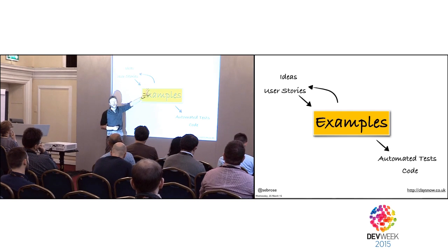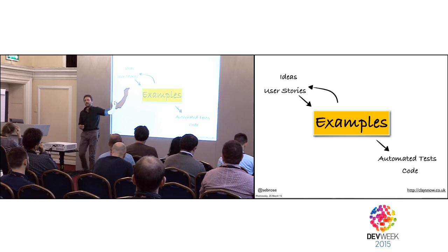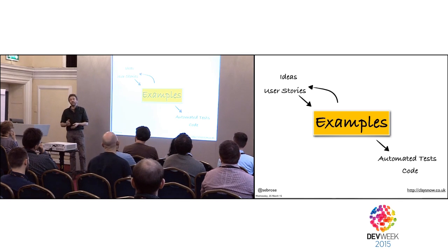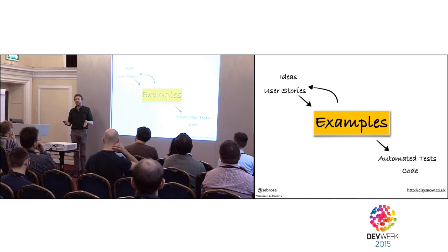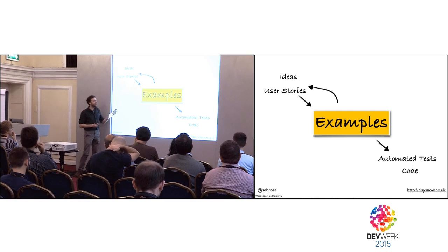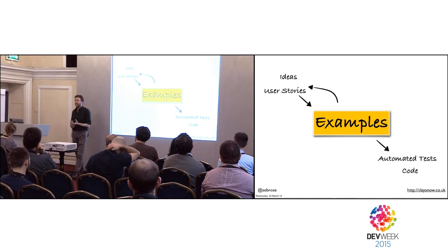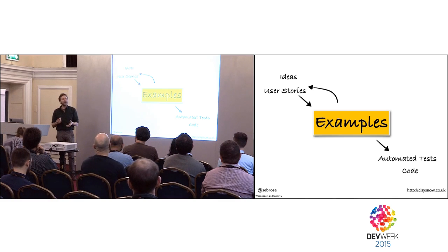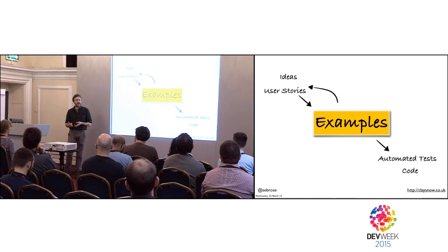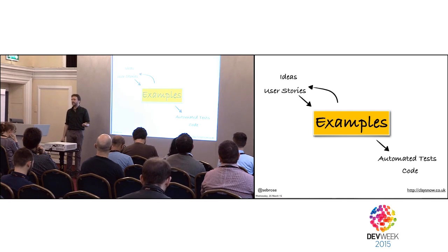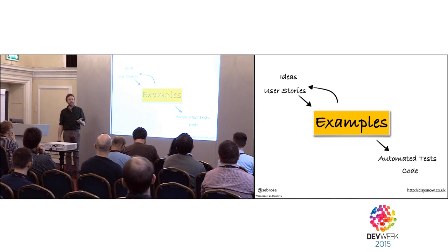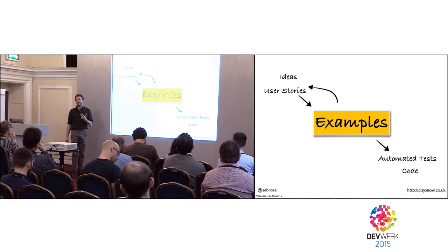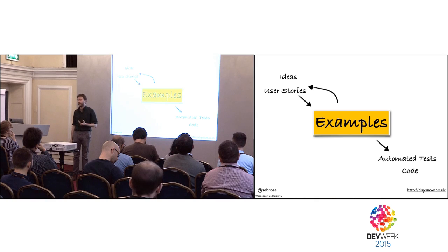And then they run a workshop. Now this workshop in the BDD documentation is called the Three Amigos workshop. But it doesn't matter what you call it. The idea is that you bring together a core group of people that have different perspectives on the art of software development. And it must contain, at a minimum, somebody representing the customer, somebody representing the development team, and somebody representing test or QA. And that's why it's called the three amigos in the BDD world. That's your minimum requirement, because those three perspectives are very different.